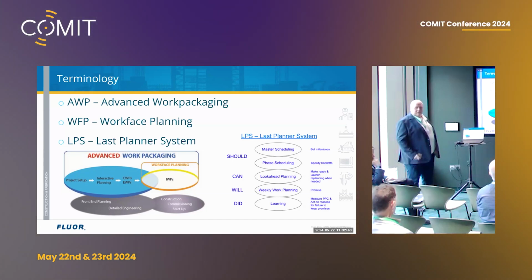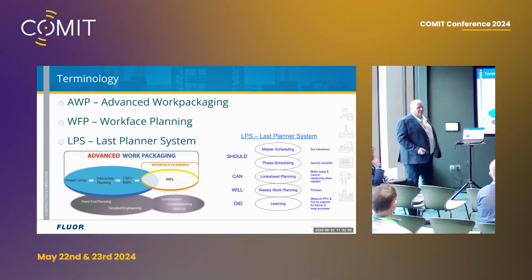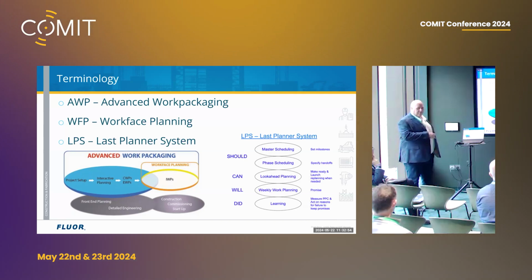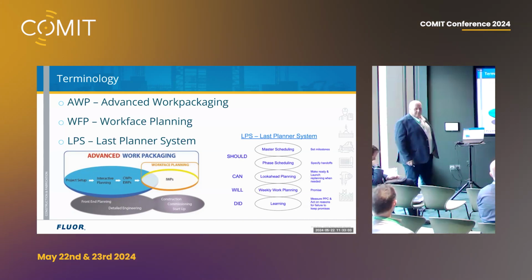So the transition over, as Martin said, the more information we have up front, the better we can go into system completions, commissioning. It used to be 65% through bulk construction. That was the switch over. If you get the data right, you can actually do it at 1%. You start thinking of turnover at 1% through bulk construction. You don't change the momentum of bulk construction. You just have that idea of where you're going.